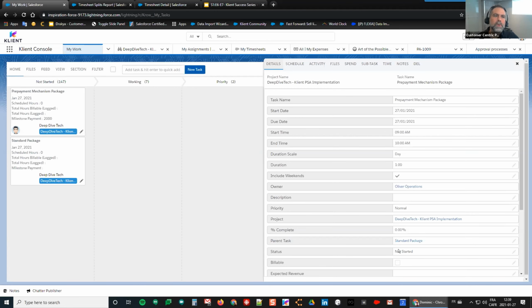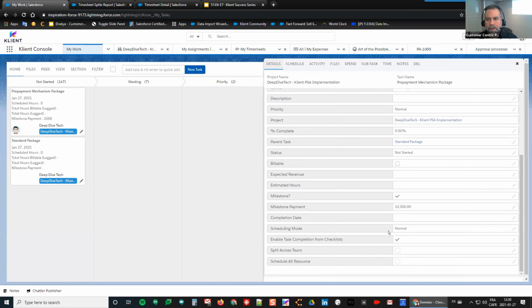Yeah. And maybe just to add on the use case, let's say you have some project that could be time and expense, but you also have some fixed fee amount that needs to be invoiced when delivered. That would be the perfect way of doing this. So creating a milestone, and when you're shipping it or it's being received, you can switch it to complete. And you can this way handle the full project with, let's say, 3 milestones: when you're a third completed, at 60% completed, and then when you deliver the entire project. So that's another interesting way of playing around with milestones, on top of the visibility of key dates that are coming up, which we're also going to see in a few minutes.